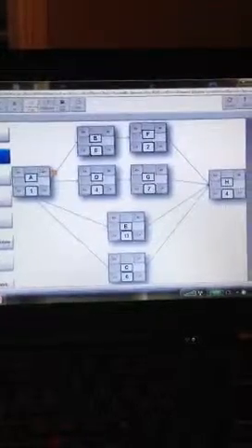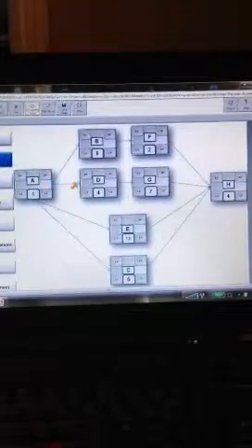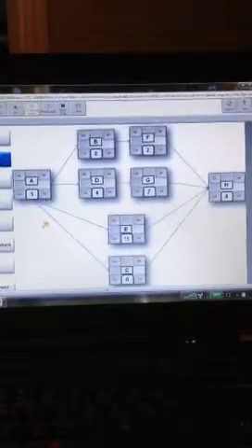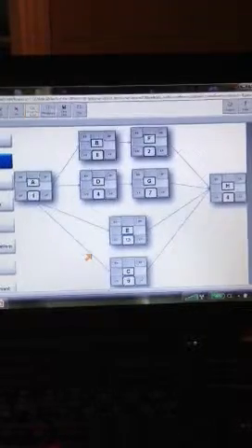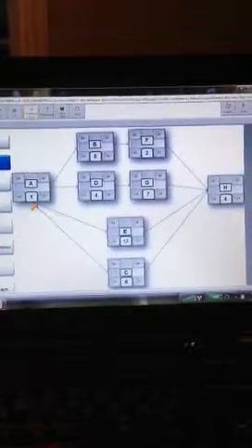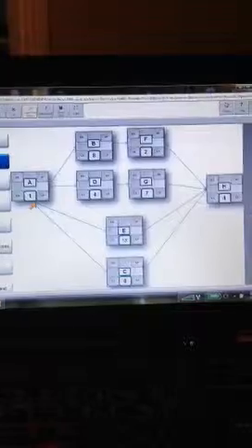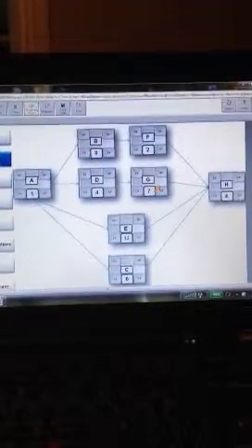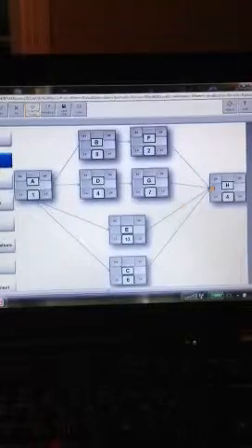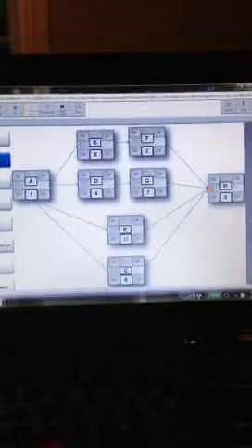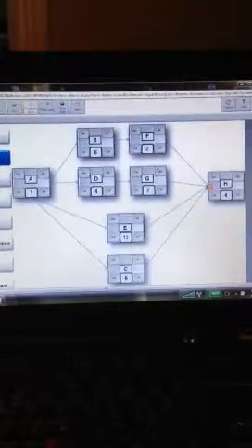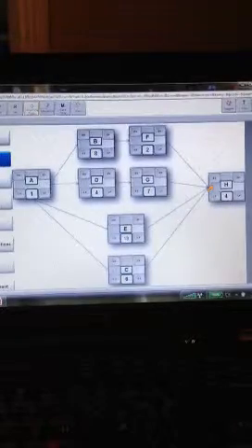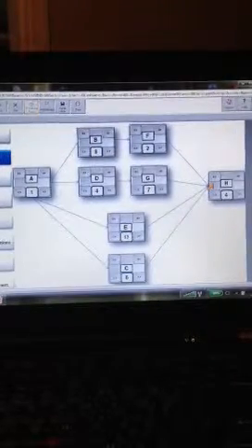There is divergence, right? It's diverging into other activities. It's connected to other activities. So activity A diverges or splits off into the other activities, and then everything converges onto activity H. So looking at this, you already know that A and H are part of the critical path. They have to be. They're attached to everything else.